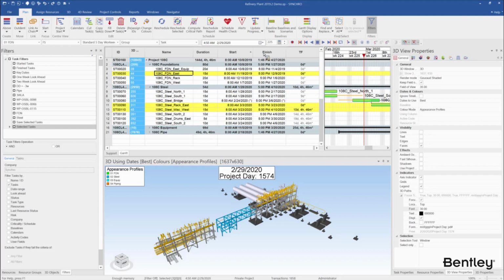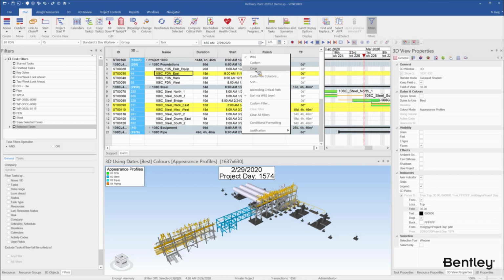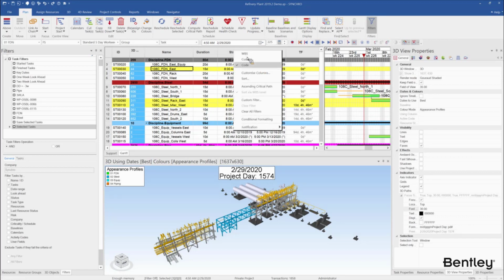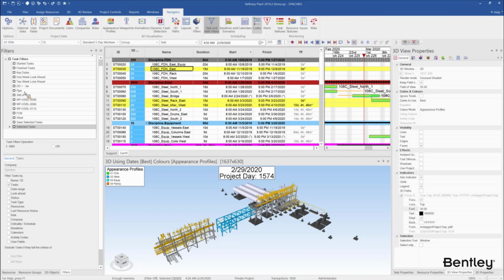Grouping tasks by activity codes. That's something I think will be nice to see. Yes. So we mentioned a little bit about activity codes, and I understand some of the projects are only using activity codes, so they get a flat list if by default Synchro is using the WBS layout for grouping tasks. So this option right here gives you the flexibility to group by activity codes, and I think if we